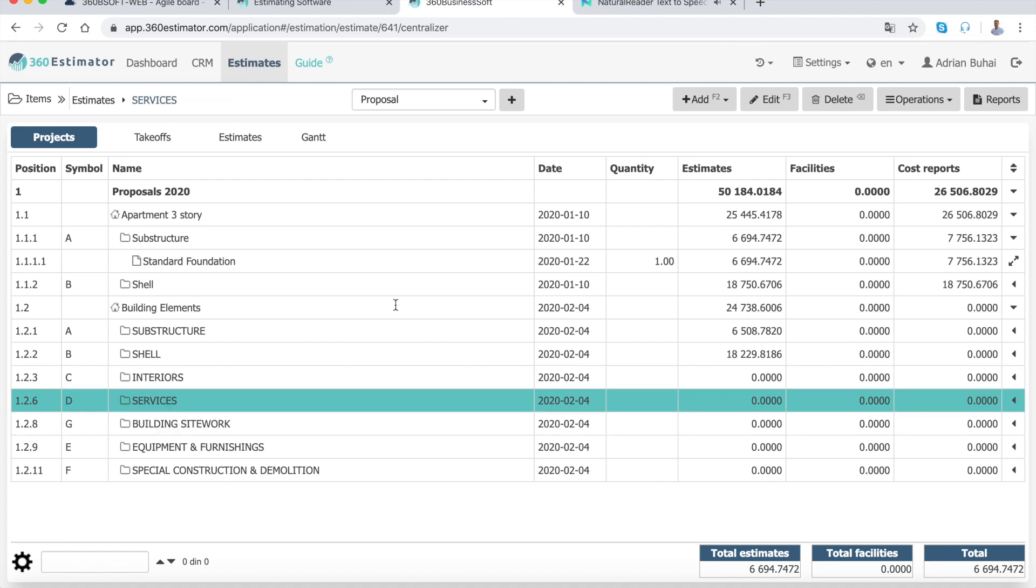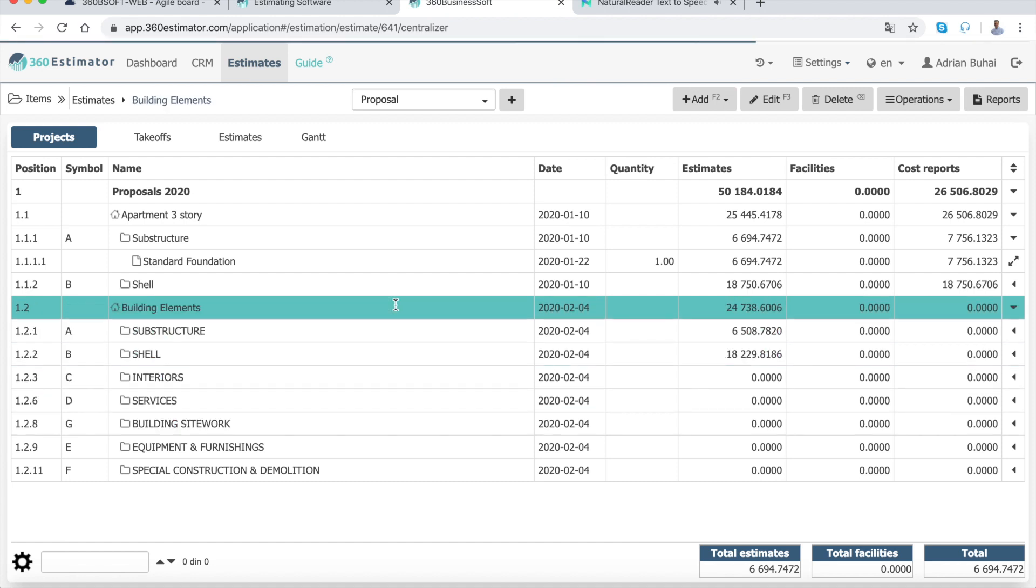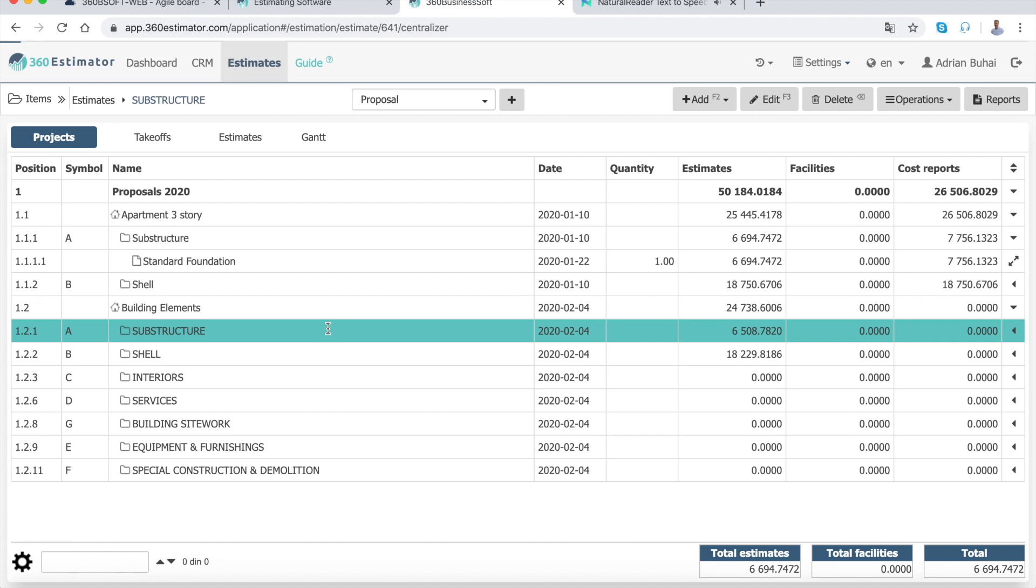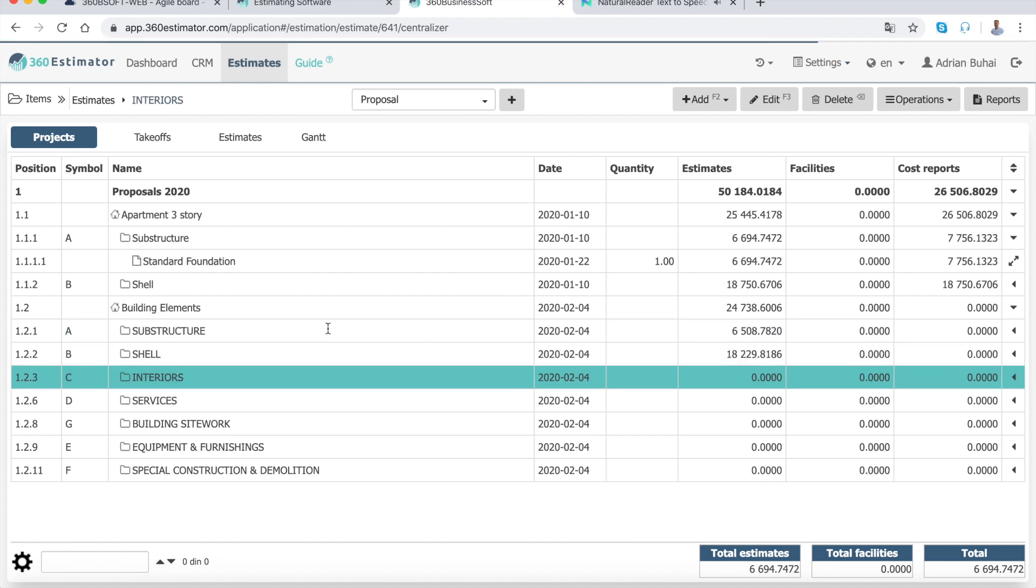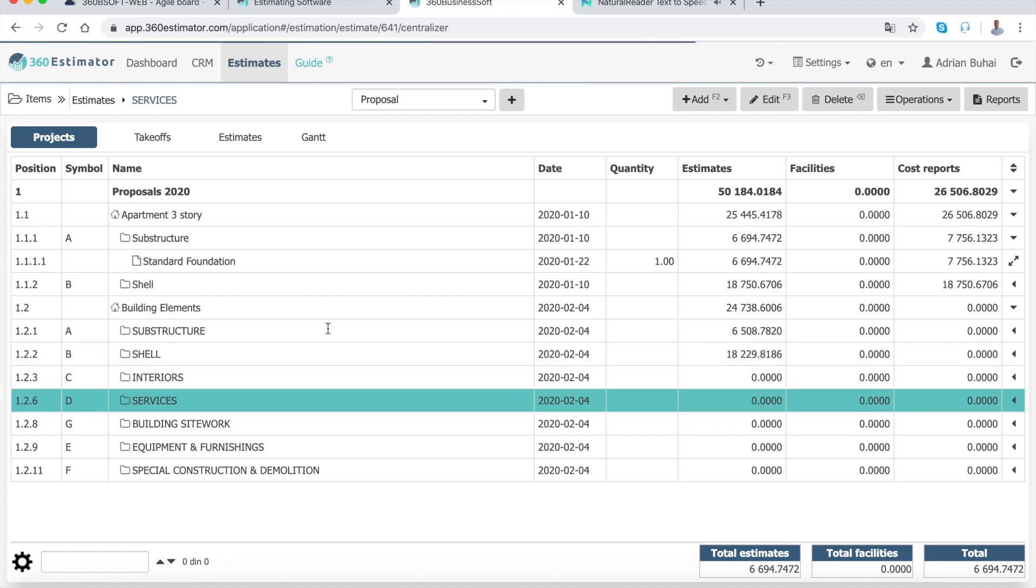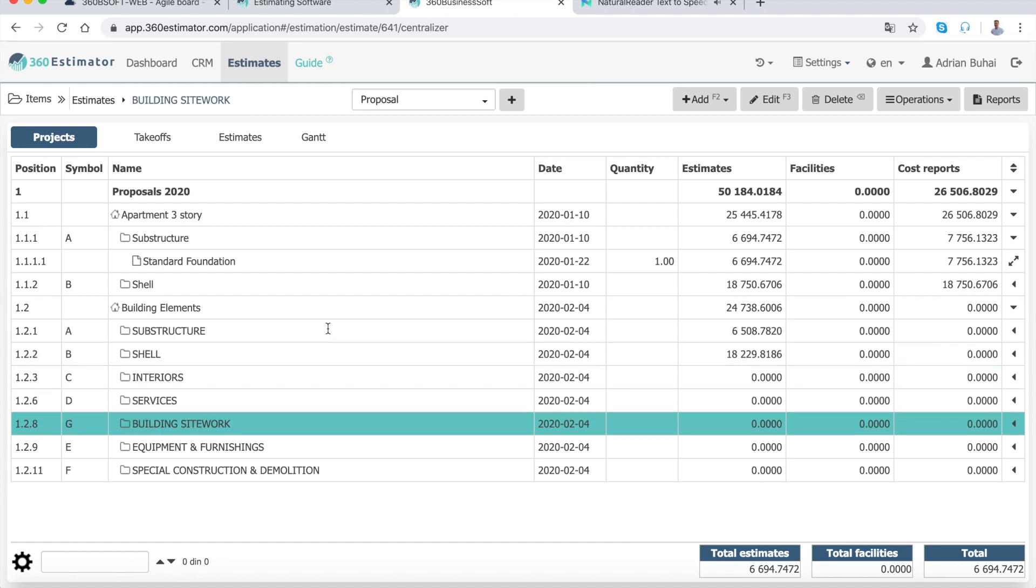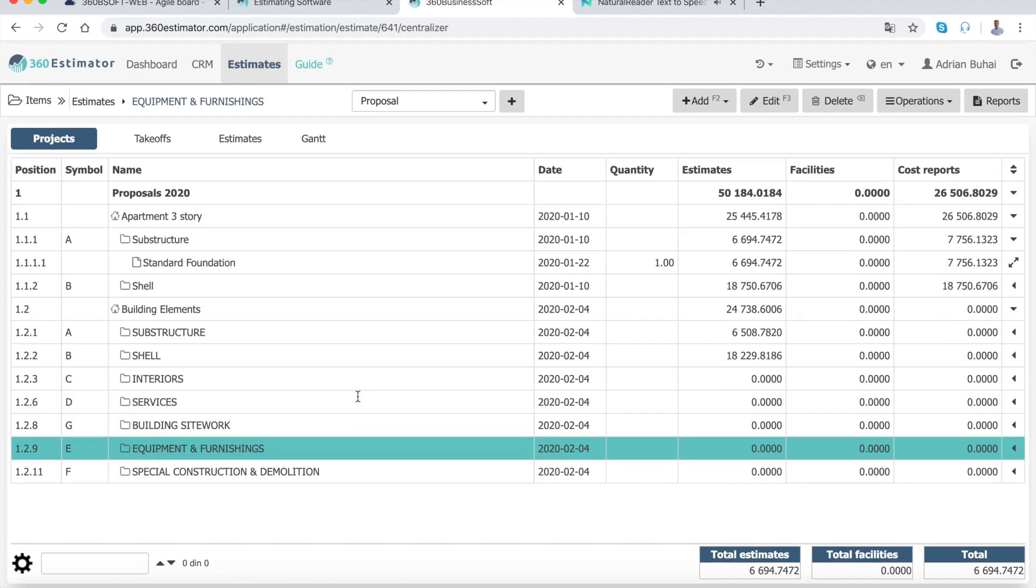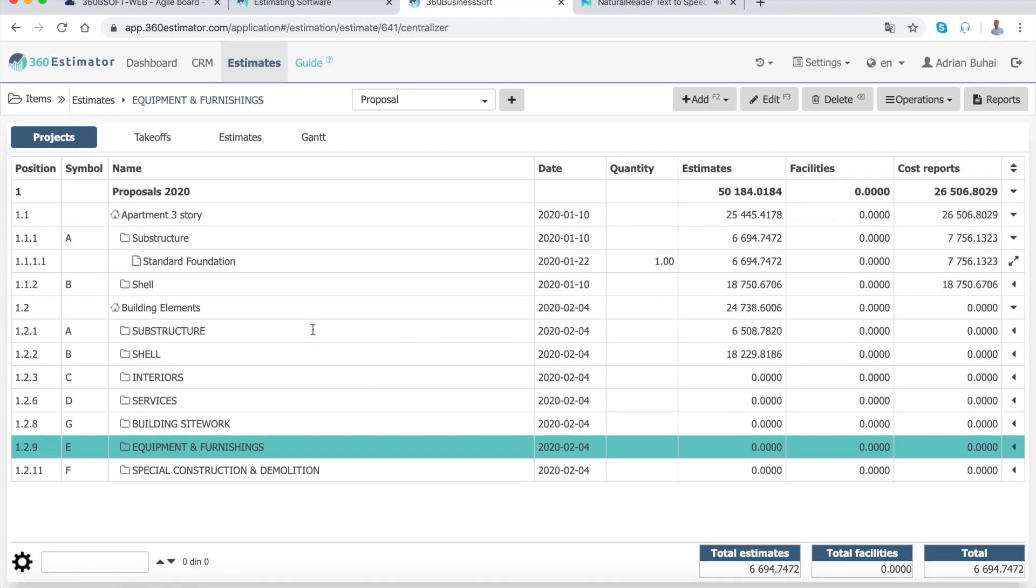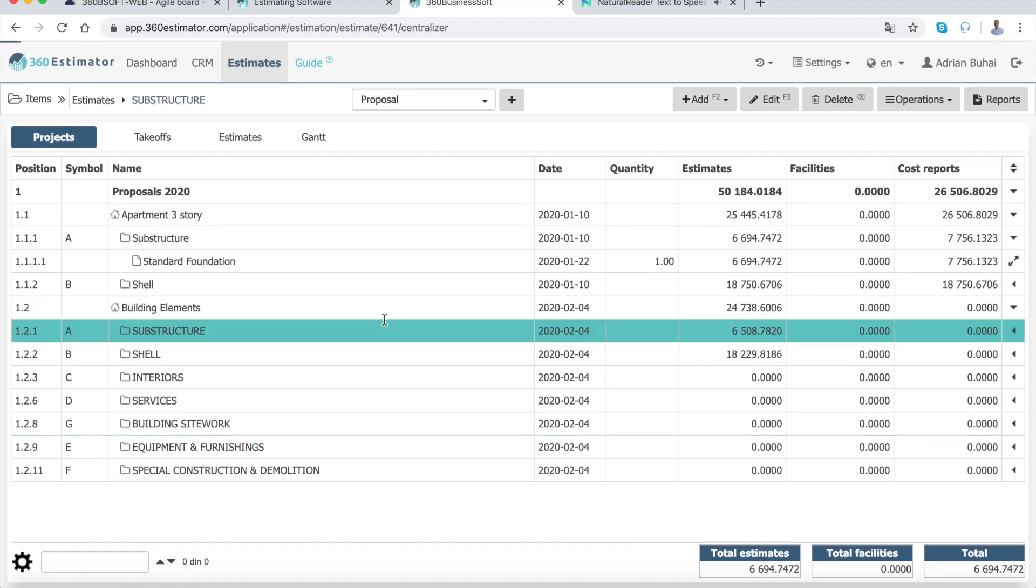Cost estimators may use Uniformat, a building elements template with a set of six functional divisions. These are: Substructure, Shell, Interiors, Services, Equipment, and Furnishings.